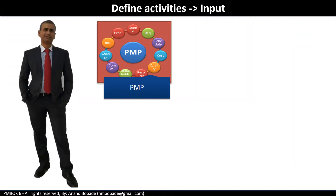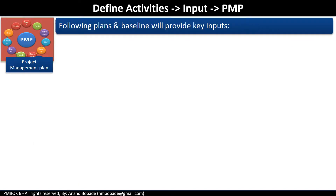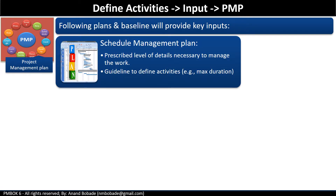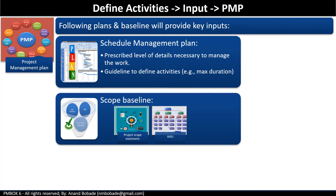Inputs are: project management plan, enterprise environmental factors, and organizational process assets. The components of the project management plan that are input to this process are: the schedule management plan, which contains guidelines for taking the WBS and using it to create an activity list; and the scope baseline, which is the approved version of the project scope statement, WBS, and WBS dictionary. The WBS further breaks down scope to the level of work packages, and the WBS dictionary contains information about constraints or other important details associated with each work package.